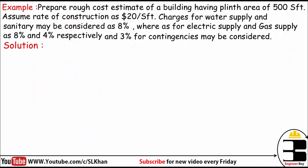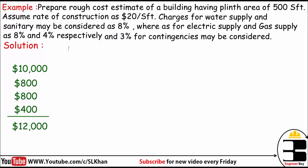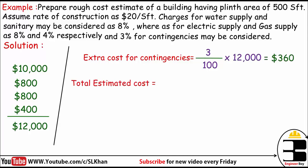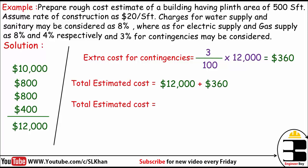The total cost at this point is $12,000. Now we take 3% for contingencies — dividing by 100 to remove the percent sign, if it is 3 in 100, then how much should it be in $12,000? We get $360 as the extra cost for contingencies. Finally, the total estimated cost is $12,000 plus $360, which equals $12,360.